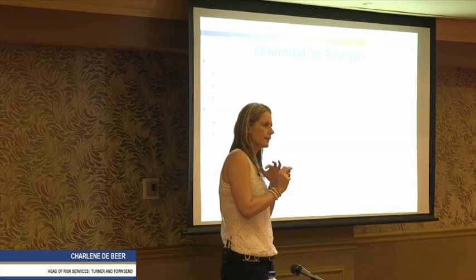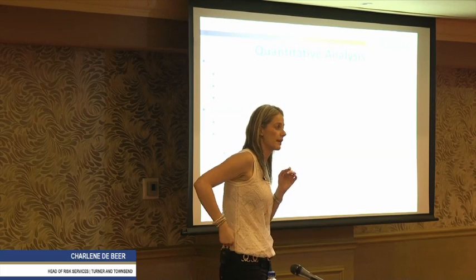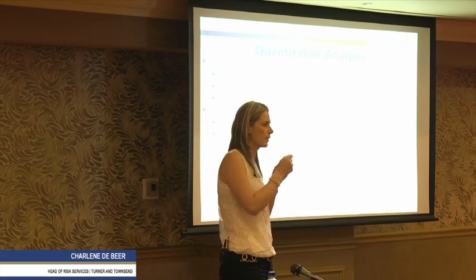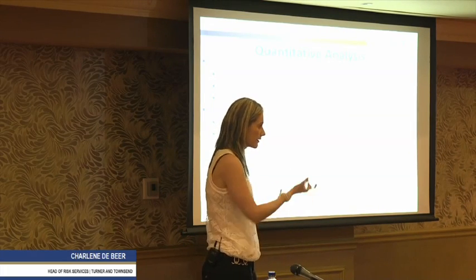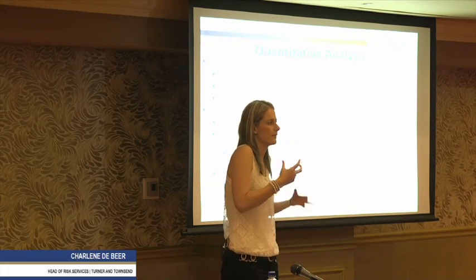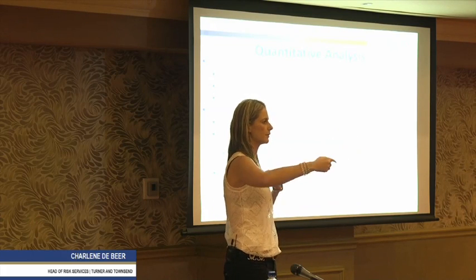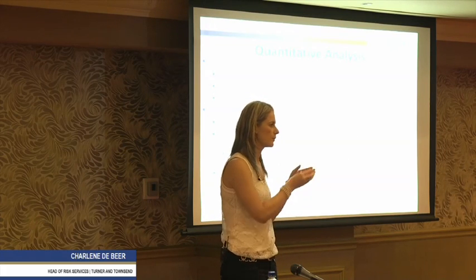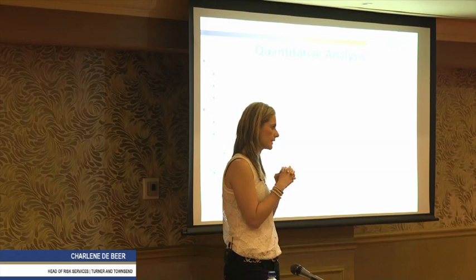So the only thing that you can sometimes question is how accurate is the proportion that we've assigned to the affected area. But the cost is tangible, it's a real thing. It is what we physically pay the civils guys for every week, whether they work or downtime. That's what they usually cost us on our site. So if we would overrun on civils with a week, with those likelihoods, it will probably cost us that amount of money. Does that make sense?